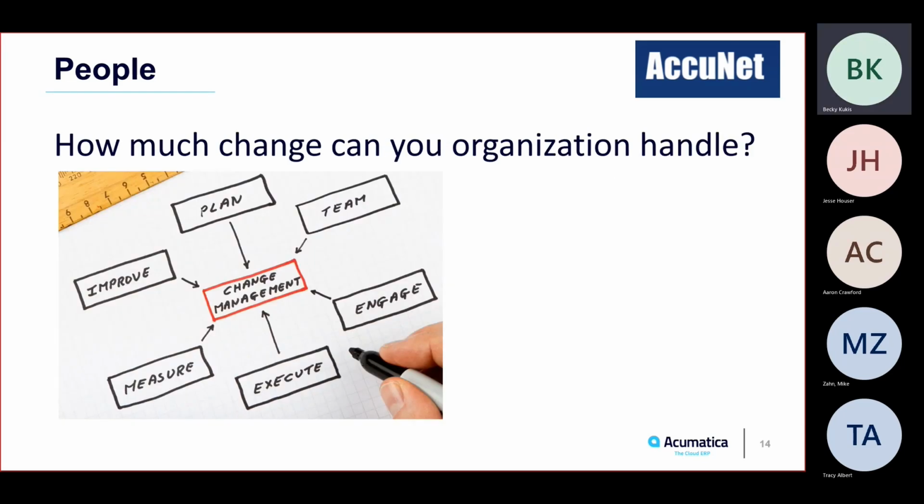And then you really want to think, how much change can my organization handle at any given time? I think it's real important that when people are going to a new system, they manage the change. By managing the change, I mean you have a current system that does ABC, and you would love to have DE, all these other things, but I can just get by on ABC, and that's phase 1. That gets me live on the product. It's doing exactly what I'm already doing in my current system, but now I can start adding all these new features. So then you've got phase 2, phase 3, things that you may want to add on later and actually integrate more with the system. Because that's the way you're managing the change. Change is inevitable. We're all going to go through changes in life, but this way you can manage it by putting it in phases.